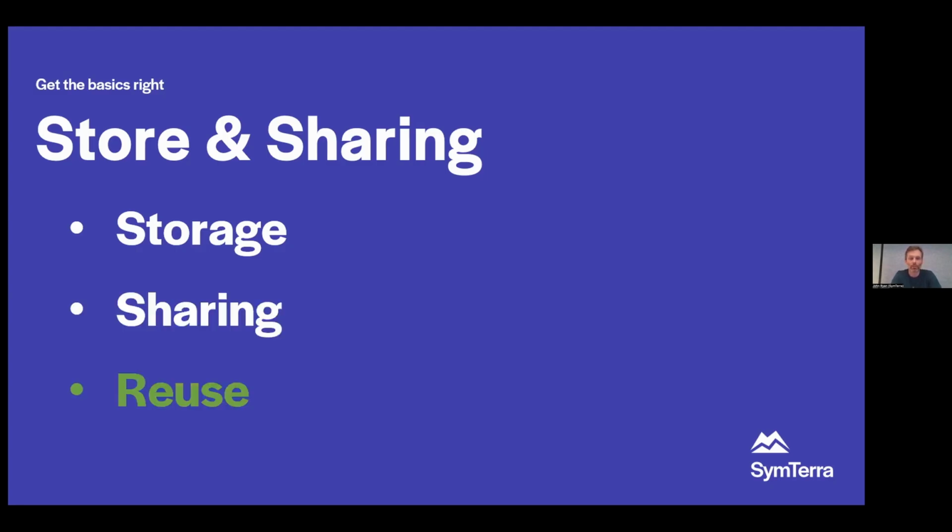And finally, reuse. Now, sharing is great until you have to continue modifying, editing, and cleaning up information. So think about it as having 20 site diaries on site. At the end of the week, you're having to look through the 20 and do an updated report on what was the week's progress. Now, if you can capture it in a way that can be imported to Excel, Power BI, dashboards, etc., then you can have these weekly, monthly dashboards with real-time information, which will greatly reduce your admin time. Project photos, reports, and updates can be used again and again to share it internally with clients and external stakeholders to promote your job, to share good practice and lessons learned.